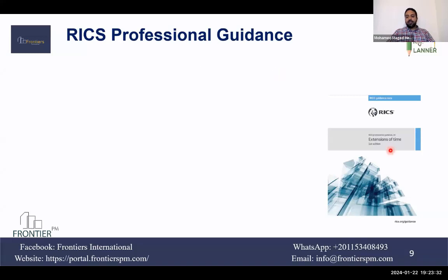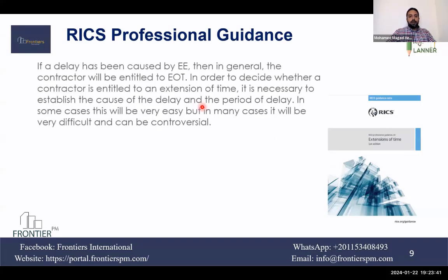In the RICS extension of time professional guidance, first edition, if a delay occurs caused by an employer event, then in general the contractor will be entitled to extension of time.